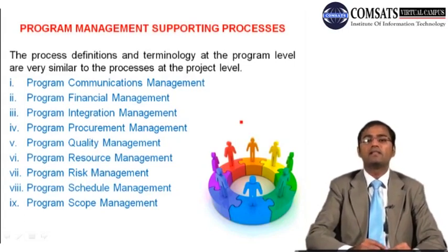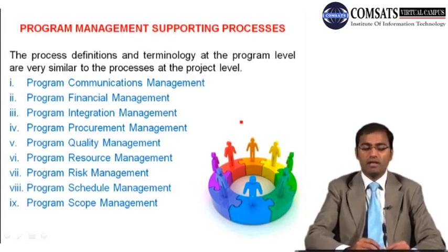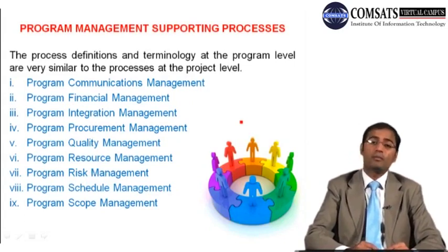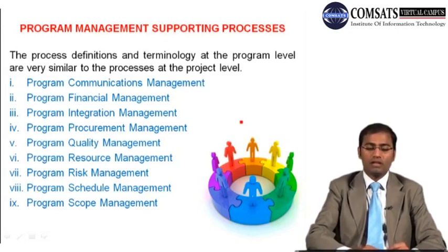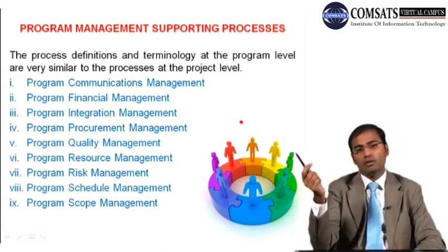The contingency reserve is kept by the project manager, whereas at program level the remaining management reserve is kept by the program manager.